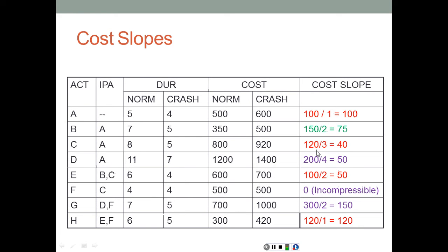So looking at the cost, A by itself is 100. BC with any other activity already exceeds the 100, so that's not our choice. Therefore, we find out that the cheapest activity to be compressed is going to be activity A.